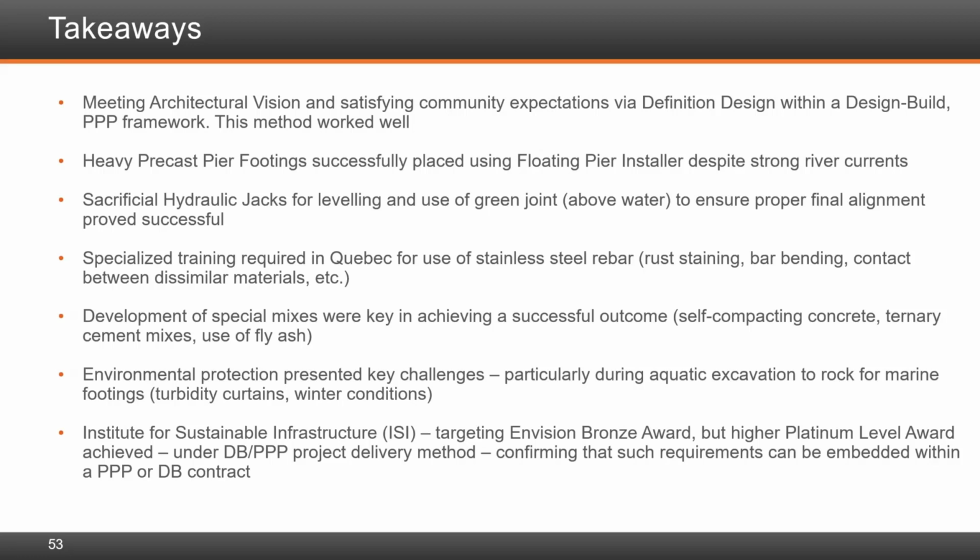Marwan, I'll just add one word on that. When the government announced the bridge, the community expectations, we had renderings and the minister at the time showed a rendering of the bridge to the population and said, what you see is what you get. So there was a commitment to the community. This is what we're promising. In the end, this is what you'll get. In terms of some of the prescriptive elements other than the aesthetics, there's also always that balance to be achieved. Some would say we were too prescriptive. Others would say we weren't prescriptive enough, and we even went through an audit of the project by the Auditor General of Canada, and we were debating at what point do we let the experts and the industry deliver something, and to what extent we prescribe things. And there's different debate on that. Working with some design builders, they say if the owner knows what he wants, well, state it, so we don't have to fight that out later by trying to say, well, that's not what I wanted. So I guess there's two sides to that coin.